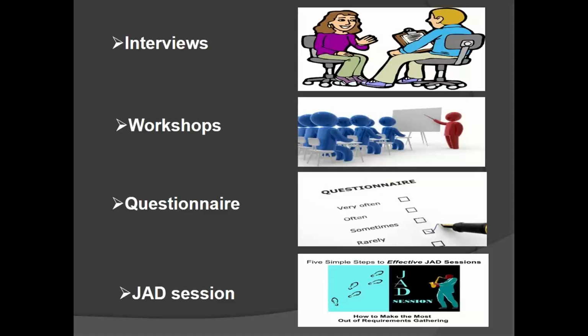Okay, so 90% of companies use JAD sessions as a requirement gathering technique, because they don't want to waste time in the project. We have some benefits with JAD sessions. The first one is that it reduces the time taken for the SDLC. Suppose you do requirement gathering using other techniques, you may complete the project within 1 year. But if you use JAD sessions, you may complete it within 10 months, because the entire process is shortened.